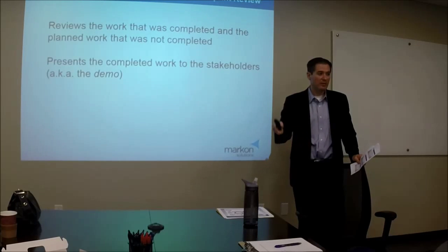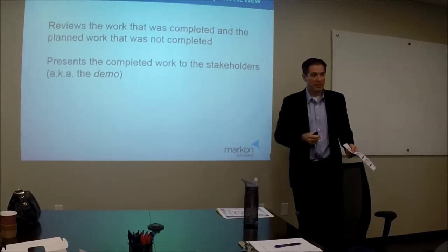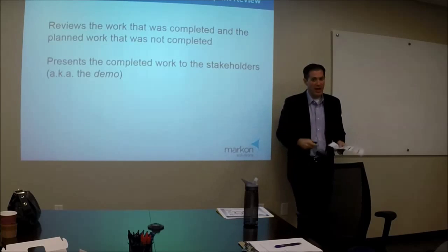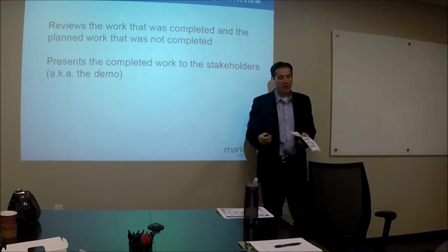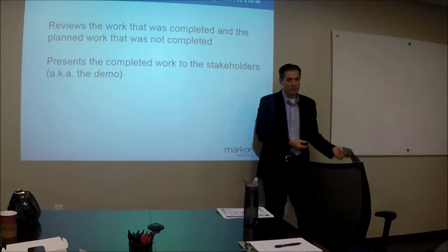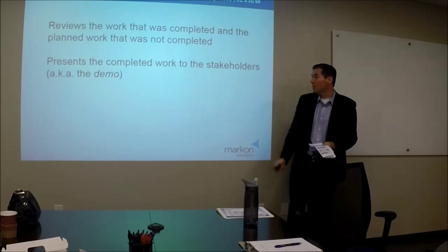So the product owner provides feedback. It's really important that you get that feedback. It's really important that you take on that feedback and add backlog items based on it. Hey, I don't like this feature, or hey, I don't like the way we do X. Okay, well, let me add that to the backlog as something we may or may not want to address in future sprints.